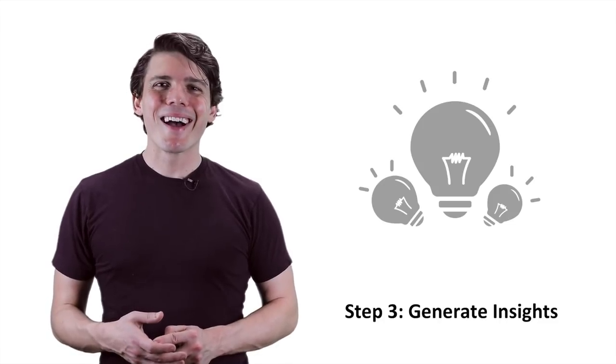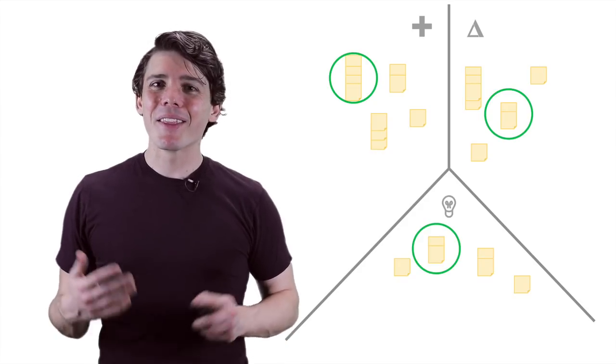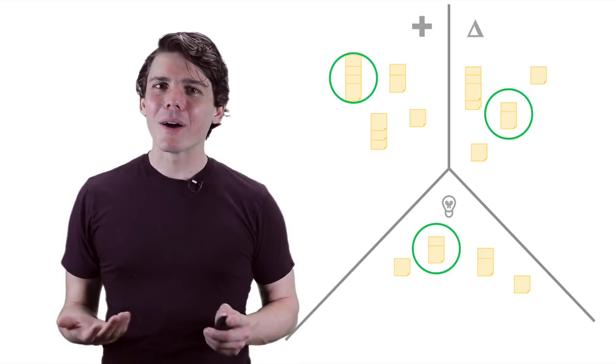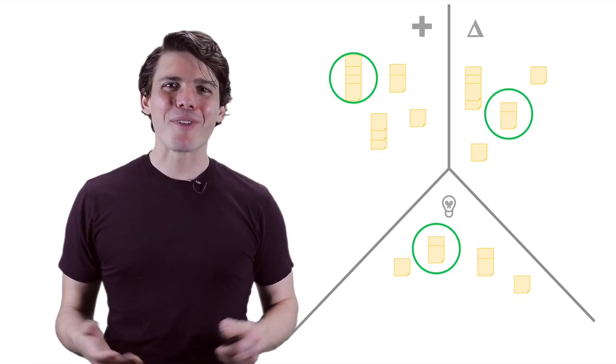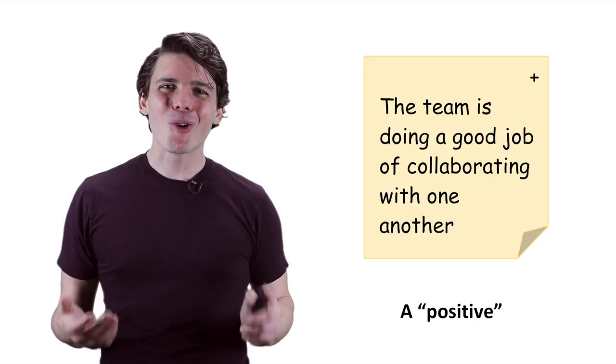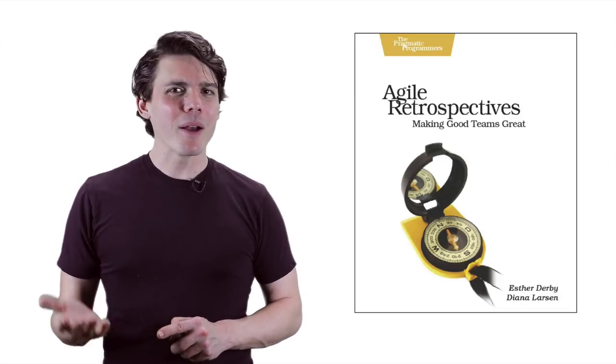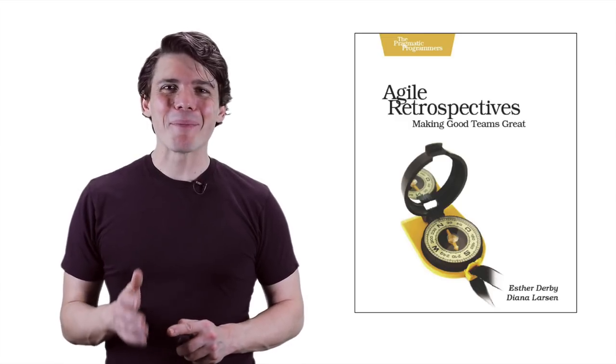Step three is to generate insights. I like to add a brief intermediary step, which is to choose the top positives, deltas, and or insights that we'd like to focus on, about one to three total. Once you have the top one to three items, dig in more on each one. The book, Agile Retrospectives, has a good activity called prioritize with dots that can make this go faster. If a positive reads, the team is doing a good job of collaborating with one another, and a delta reads, our staging server keeps going down, try to understand the root cause of these conditions. Some teams find it helpful to ask why five times, give or take, until you get to your root cause. Agile retrospectives suggest other exercises as well. As a hint, if you're rarely surprised by your root causes, you may not be digging deep enough.